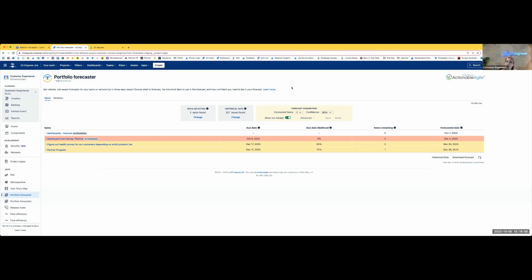Because the issue with story points is that they're not always fully reliable. And from one person to another, the way you rate the complexity of the work might be different. So using your actual data to forecast will give you a better result in the end, or at least a more accurate forecast. It might not look as good as you would want, but that's your actual forecast.